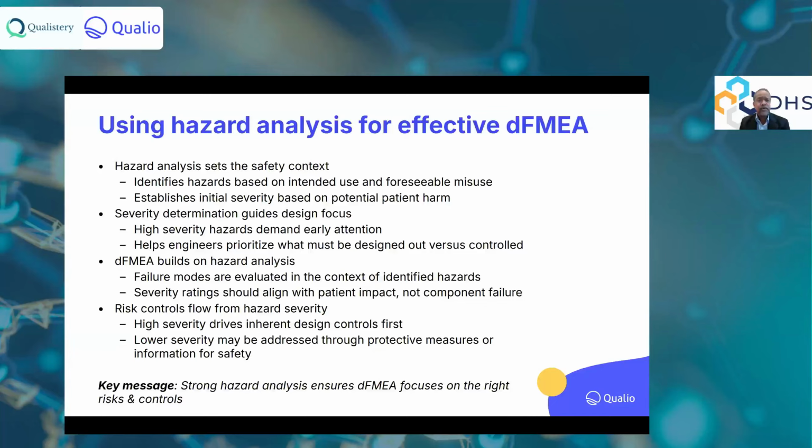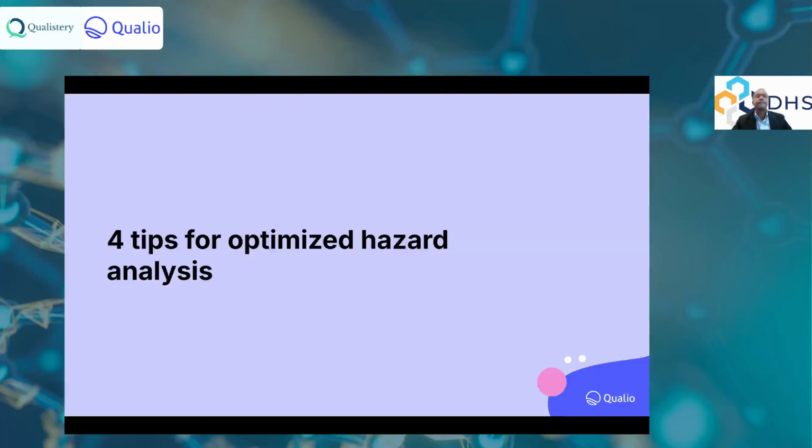Message here: strong hazard analysis gives good input to your engineering team, and ensures good DFMEA focus for the right risk and control. By the way, it's not just DFMEA, but also cybersecurity FMEA, if you apply that process, and also for use-related FMEA. We call it UFMEA.